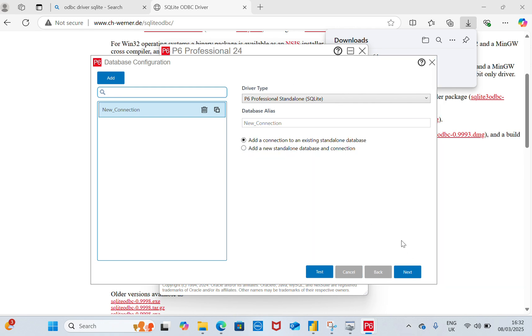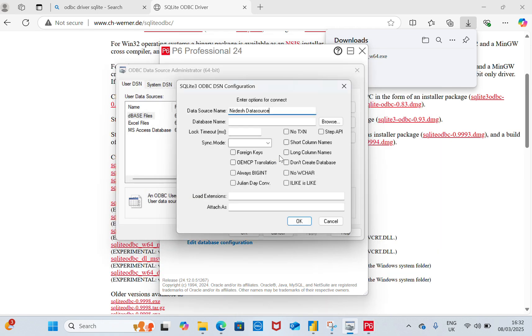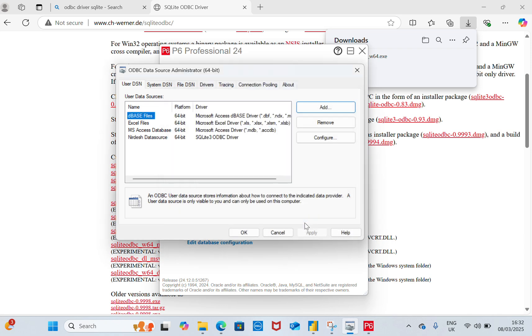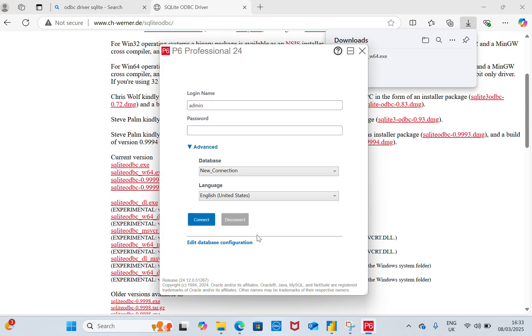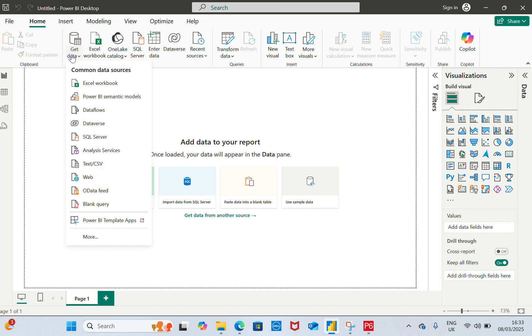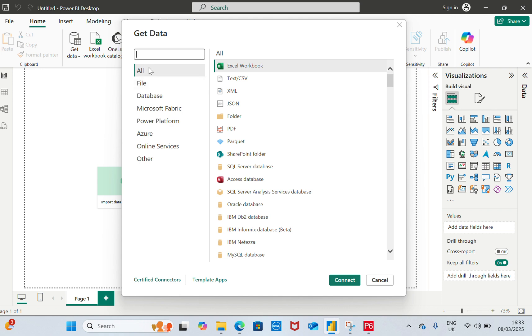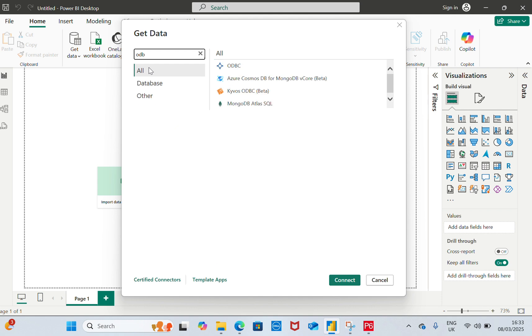I'll close it and I'll paste it and I'll click OK. Now you can see my database source from P6. I'll click OK and I'll close it. After that we have done this, we'll go to our Power BI Desktop. We'll click on Get Data, then we'll go to More, and we'll click on ODBC to link it with the Open Database Connectivity.